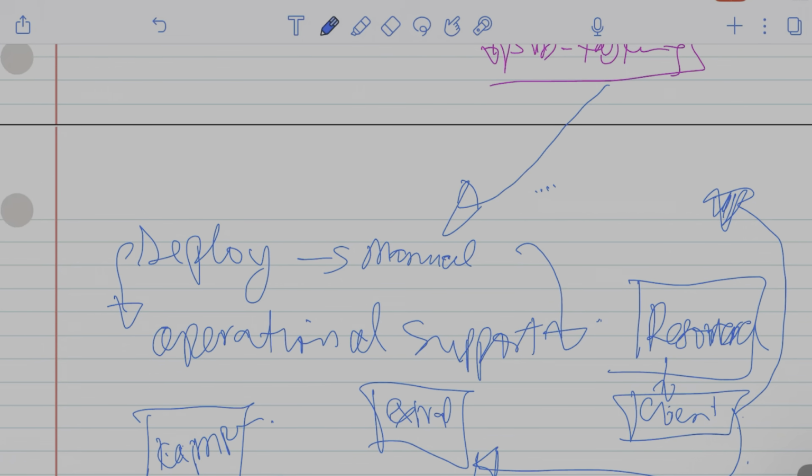If you're fortunate to have access to the repository that gives an explanation, you can go there and learn. Right, but they will not give you access to the testing environment or the deployment environment when you're not part of that team. So I will focus on me being within the Scrum team, and at that level, what are we doing? The release management gives you a clear date and what features are going to be there. Ask them questions, make sure that you give it a 2-week buffer and you help your team release that. That is good enough. No one is going to crucify you because you don't understand the tools and the detailed process in it. You're not a release manager.